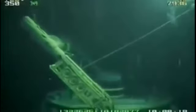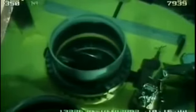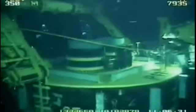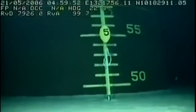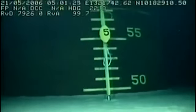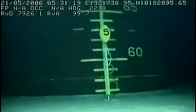The ROV moves in for step 2. It closes the valves that seal the end of the piling. Then it connects a powerful pump. As the pump sucks out the water inside the piling, the structure sinks even deeper into the sea floor. Mission accomplished, but the Balder's crew doesn't have time to celebrate. They'll work around the clock to install the remaining 3 pilings before the hub arrives.